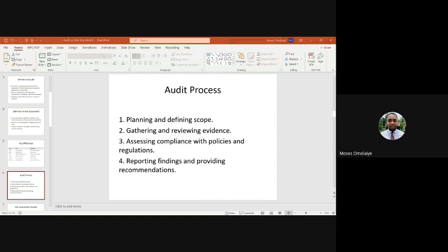Then you do a prioritization of risk. Now, how do you prioritize risk? Based on the severity. So you always categorize your risks. You could be quantitative or qualitative. Some people would say low, medium, high, severe. Some will say 1, 2, 3, 4, 5, where 1 is low, 2 is medium, 3 is high, 4 is very high, 5 is severe. But you have to categorize.